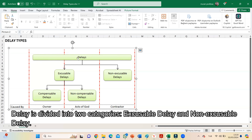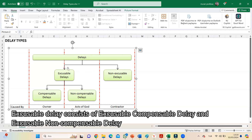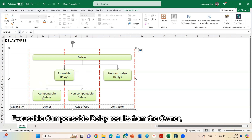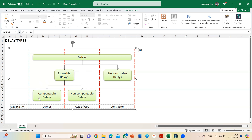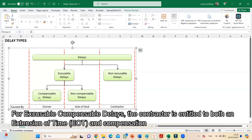Delay is divided into two categories: excusable delays and non-excusable delays. Excusable delays consist of excusable compensable delay and excusable non-compensable delay. Excusable compensable delay results from the owner. For excusable compensable delays, the contractor is entitled to both an extension of time and compensation.